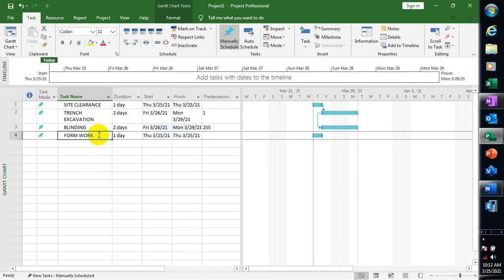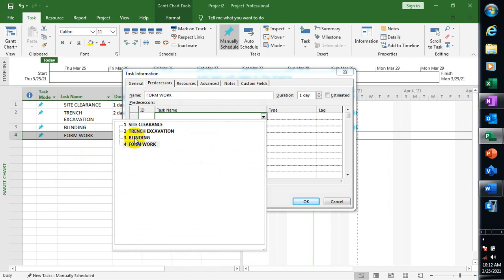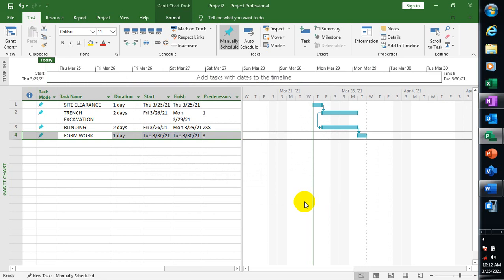Let's go to Formwork. If I double-click on Formwork and set my predecessor as Blinding with Finish to Start, I'm saying that Formwork takes one day and immediately when I finish my Blinding is when I'm going to start my Formwork.